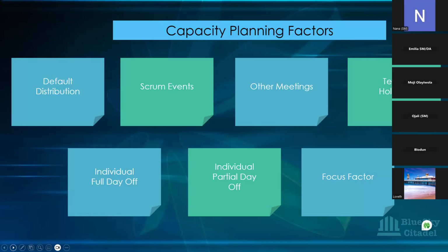You look at team holiday. Team holiday is something like bank holidays. You look at individual full day off. So these are team members' day off or partial day off. Oh, I'm taking the morning off, I'm taking the afternoon off. All those things, you think about it.